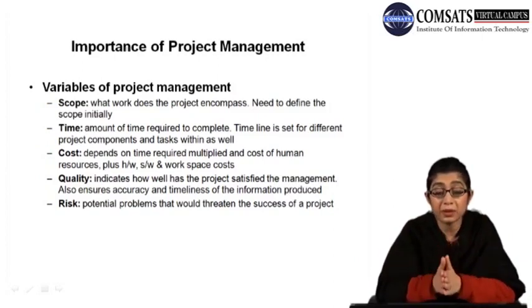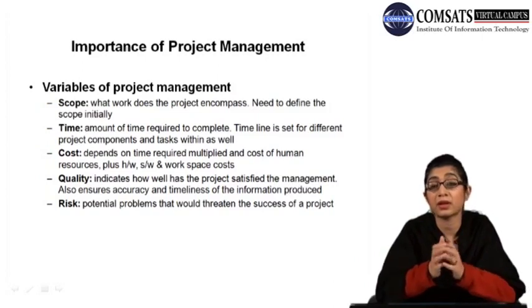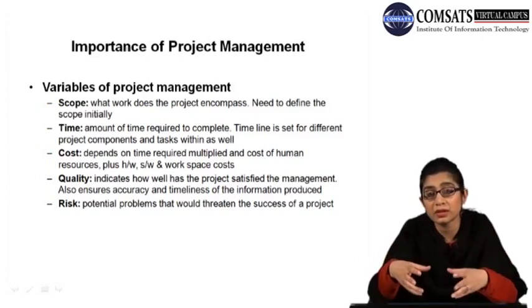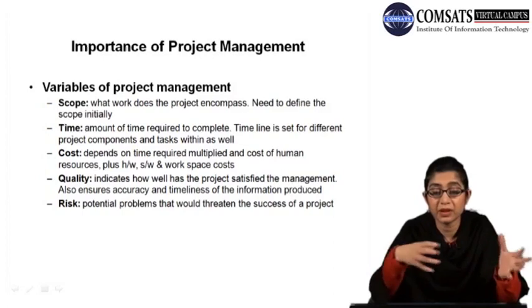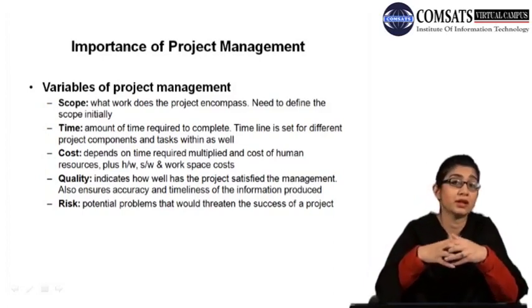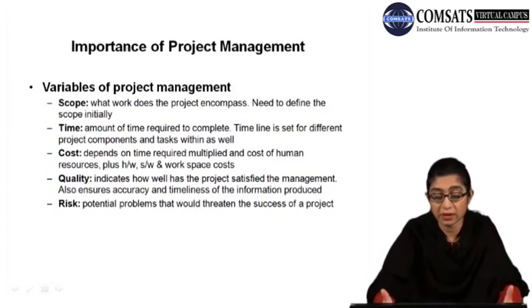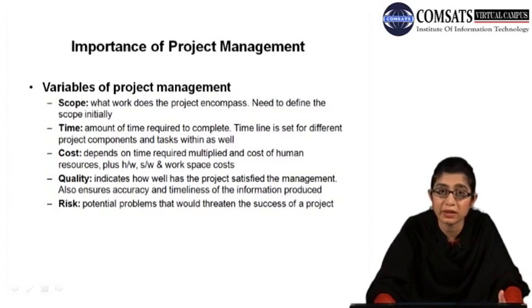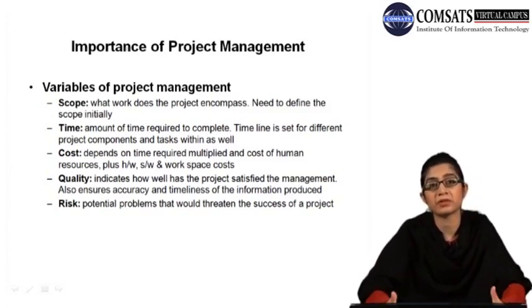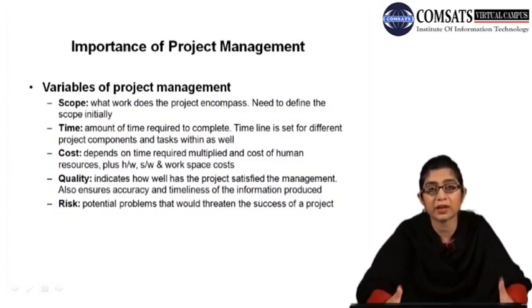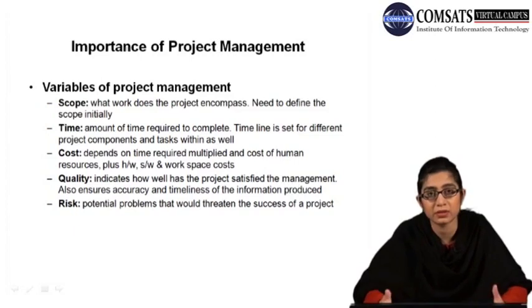Scope is what work the project encompasses, meaning what is included in that certain project and what is excluded. You need to define the scope initially. That is, these things are part of the project. For example, if you enhance an information system that is already there, then you have to specify which part of that information system it is. For example, order processing is the part we will only enhance. This is the only part that we're going to work on. This will be our project.